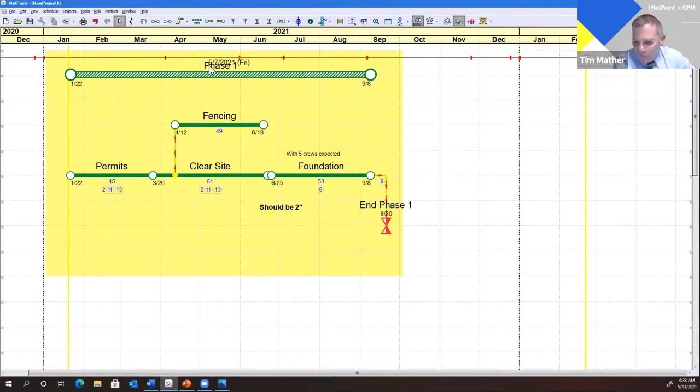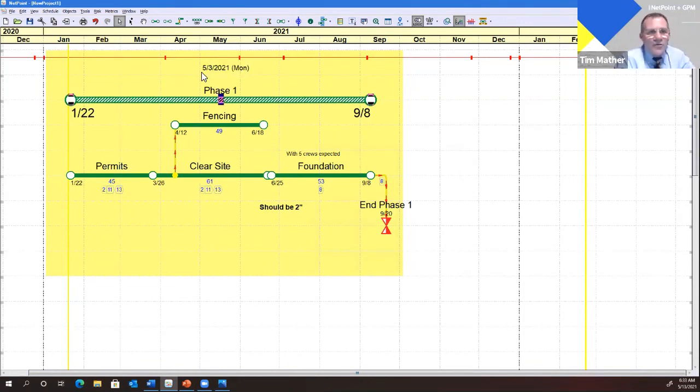And we're going to be wrapping up here for questions in just a few minutes, but let's talk about milestones as well. It's another important building block of a multi-level graphic schedule that you'll be developing in NetPoint. So a milestone is different than a benchmark in that it floats with whatever it's connected to. So I've just selected a finish milestone here.